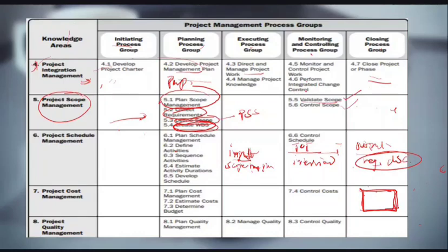You don't need to wait till the whole project is done before you seek acceptance of your work. So once you move in stages, at every stage, whatever is delivered, called a deliverable, should be validated. Validation means seeking formal acceptance, should be checked and accepted.